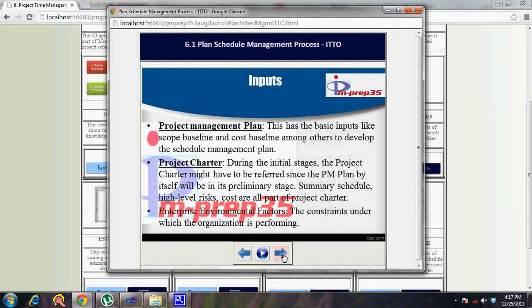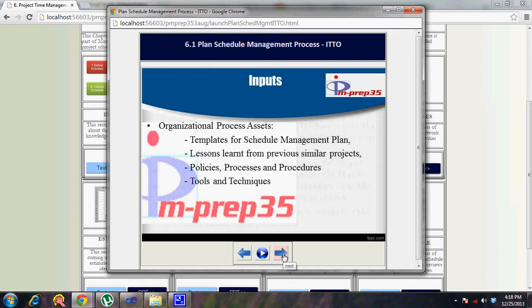The project charter is another input. During the initial stages the project charter must be referred to, since the project management plan itself will be in a preliminary stage. Summary schedule, high-level risk, and cost are all part of the project charter.